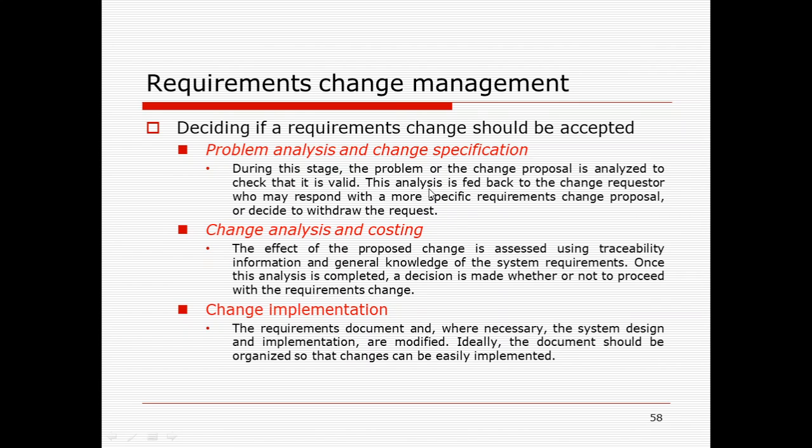Once the requirement change is analyzed and checked against the software problem statement, and if it is found to be valid, the feedback is sent to the change requester, the person from whom the change request has come.